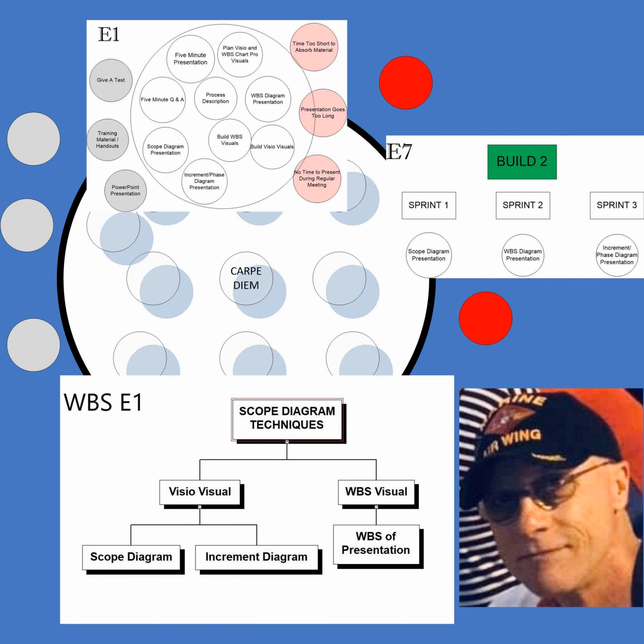So click on P3. P3 ended up, after all those move slides, 12, 13 of them, I forget exactly how many, being notes. Now these notes started as one page, and I ended up with 3 different slides of notes. Why? Because you want to go over these notes every single meeting, and I just read them one after the other, so you don't end up with someone saying those famous words, oh, that's the first I heard of that. So they don't listen the whole time, or they don't take any action.